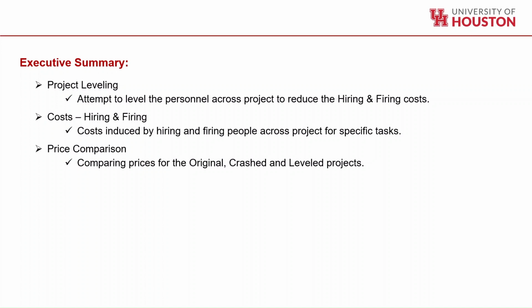Project leveling is attempting to level the personnel across the project to reduce the hiring and firing costs. Basically, we are shifting people from one system to the other. When you complete work on one system, instead of firing them, we'll just shift them to the other system. We can't shift all the personnel because some people are skilled in only one of the systems.